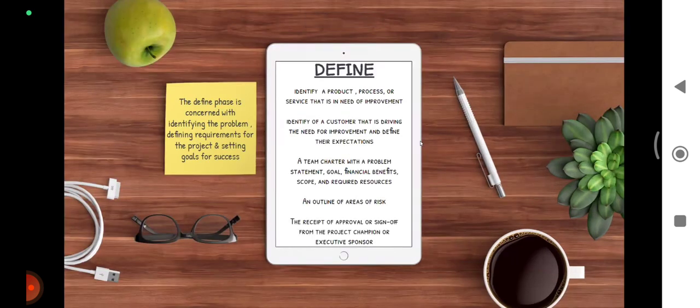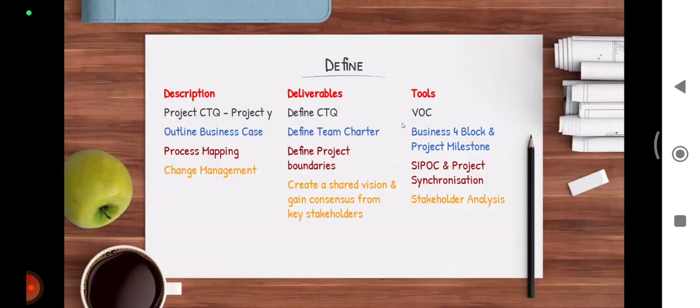to solve it. So yes, some projects, they are going to pass the define phase, but some projects do not pass the define phase, simply put, because of the cost and benefit analysis. It really does not help the organization to solve a problem of $1,000 while spending $100,000 to solve it. Okay, so that is basically what it is. It's basically an explainer stage.